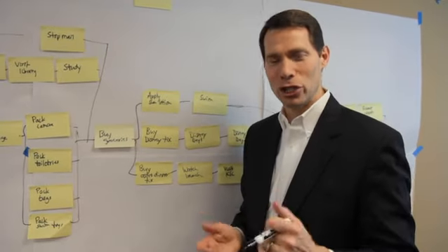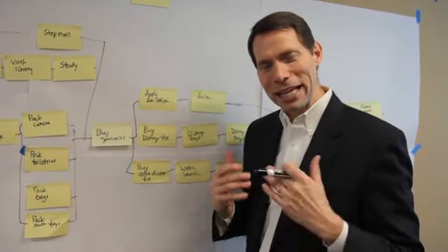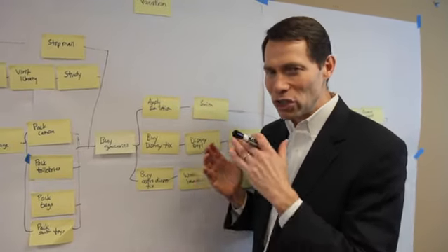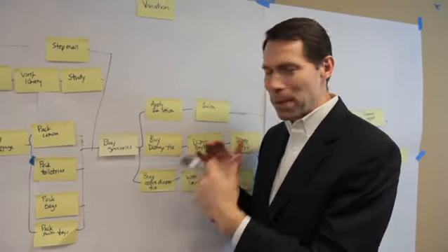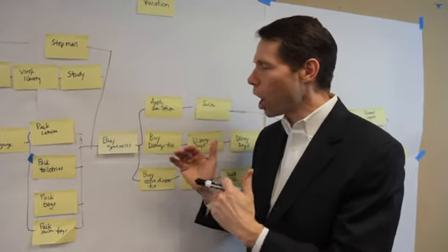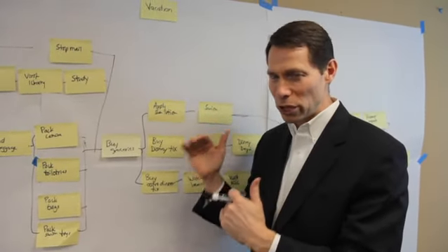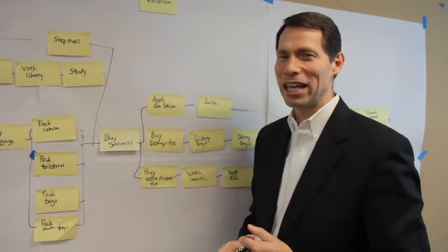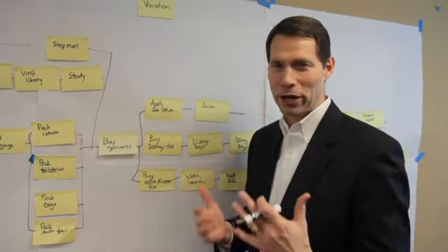So I encourage you, spend time thinking through your project. After you've done your work breakdown structure, after you've done your planning, to do sequencing and look at your dependencies and look at them long and hard of, is there another way to do this? Can we do it in parallel so that we can bring the time frames down? If you do a good job of this, it can help you much better manage your project.